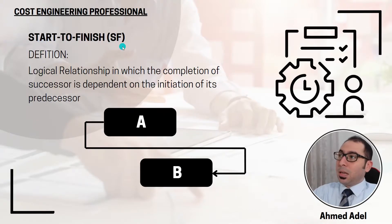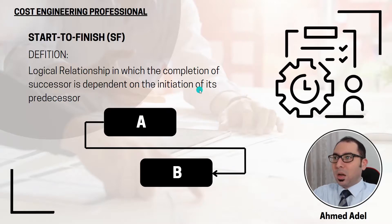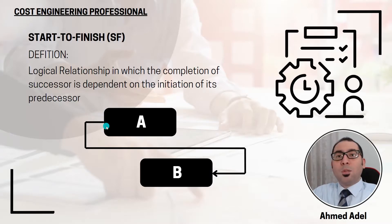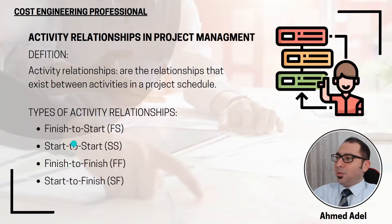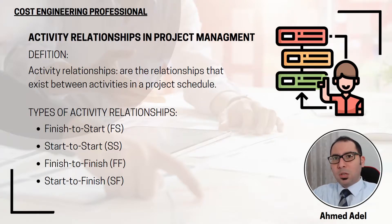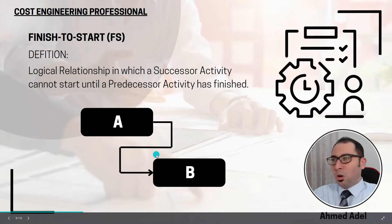The fourth and last relationship is start-to-finish. This is a logical relationship in which the completion of the successor is dependent on the initiation of its predecessor. In other words, for B to end, A has to start. Among all four relationships, finish-to-start and start-to-start are the most commonly used. Finish-to-finish appears but mainly to avoid open relationships. Start-to-finish is rarely encountered.